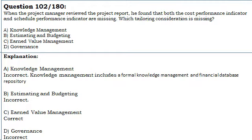C. Earned value management. Correct. D. Governance. Incorrect.